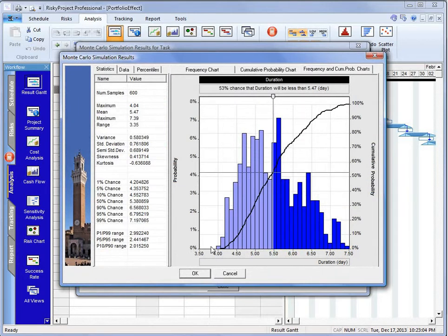What we can see here is, if you remember, when we look back at that chart, it was fairly steep. And what we see is a much flatter line. And what happens when we have these right-skewed distributions on a precedent network? The most likely, which is over here, starts to tighten around the mean. It actually moves to the right.